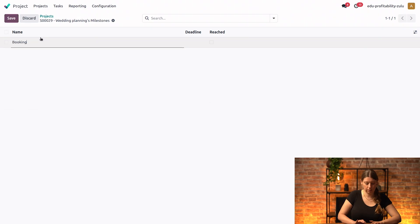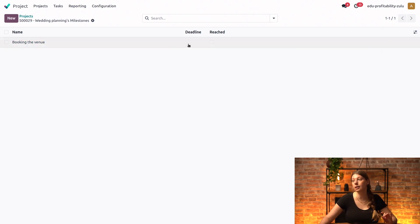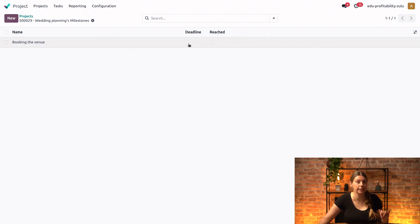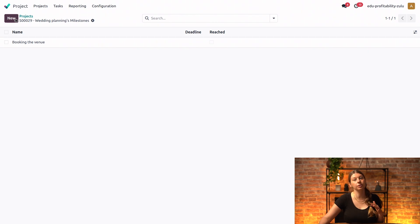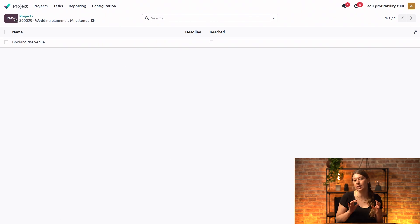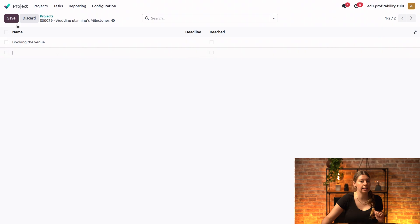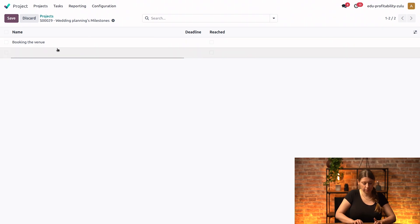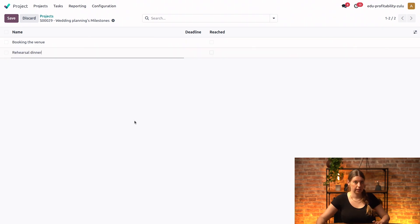So let's create that. We could also select a deadline if we wanted to, but for now we'll keep it like this. And then the second milestone will be handling the rehearsal dinner, after which we'll still have some time to reflect and adjust anything that we can improve before the big day. So let's add another milestone. Rehearsal dinner. Perfect.